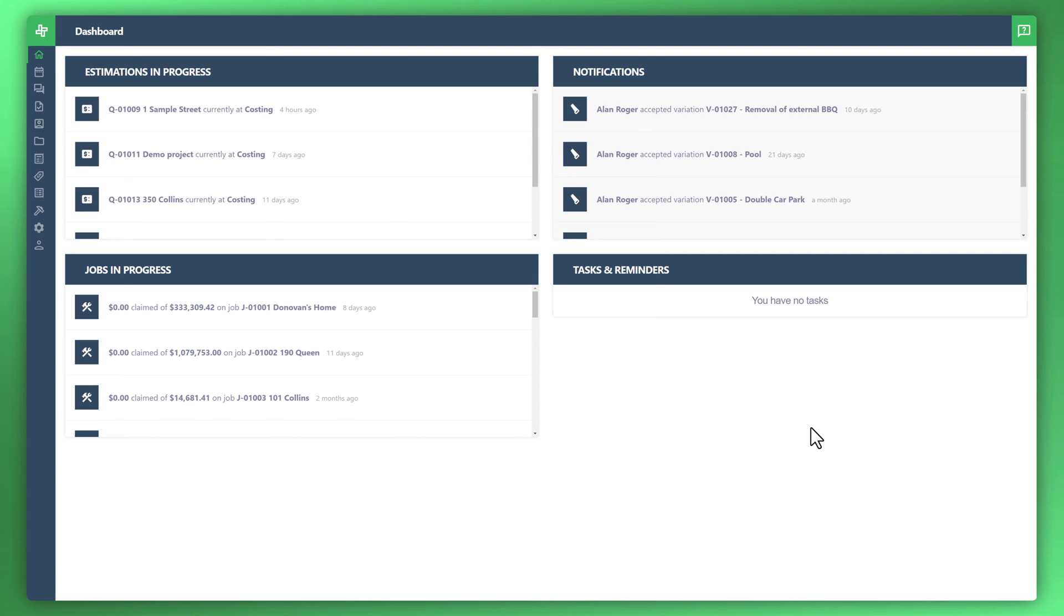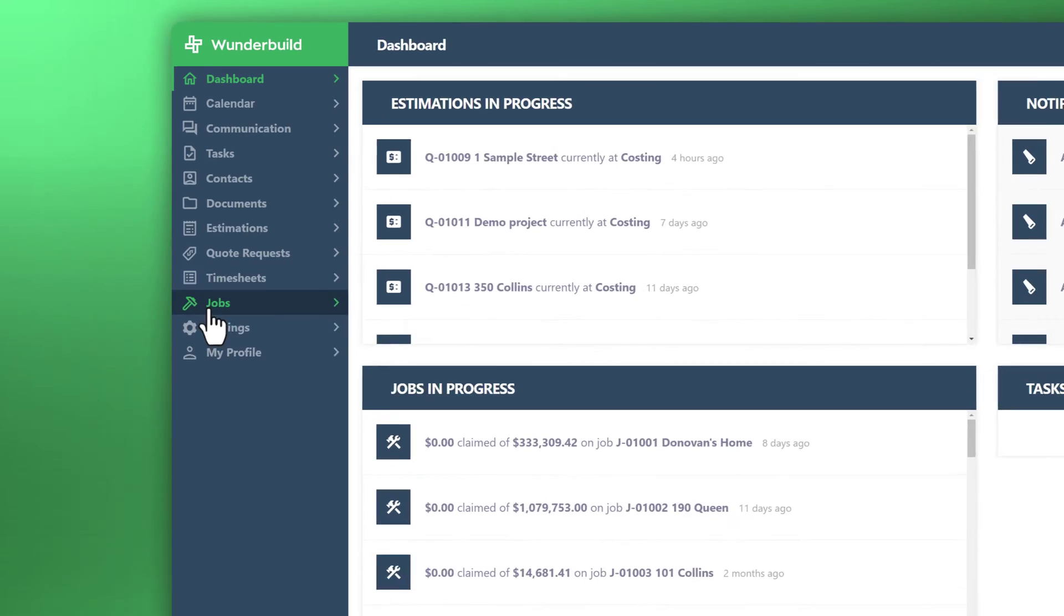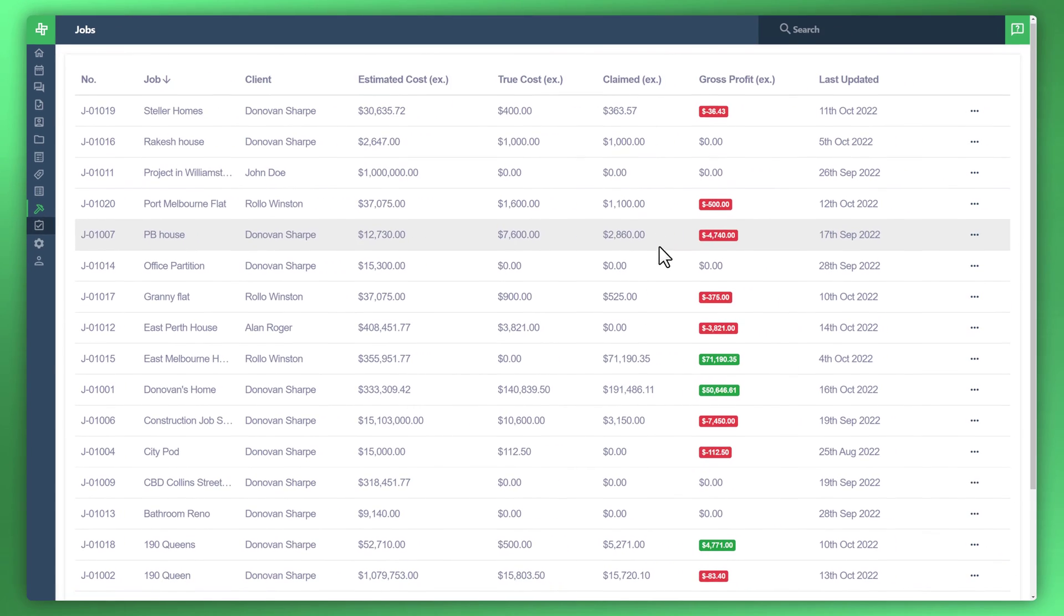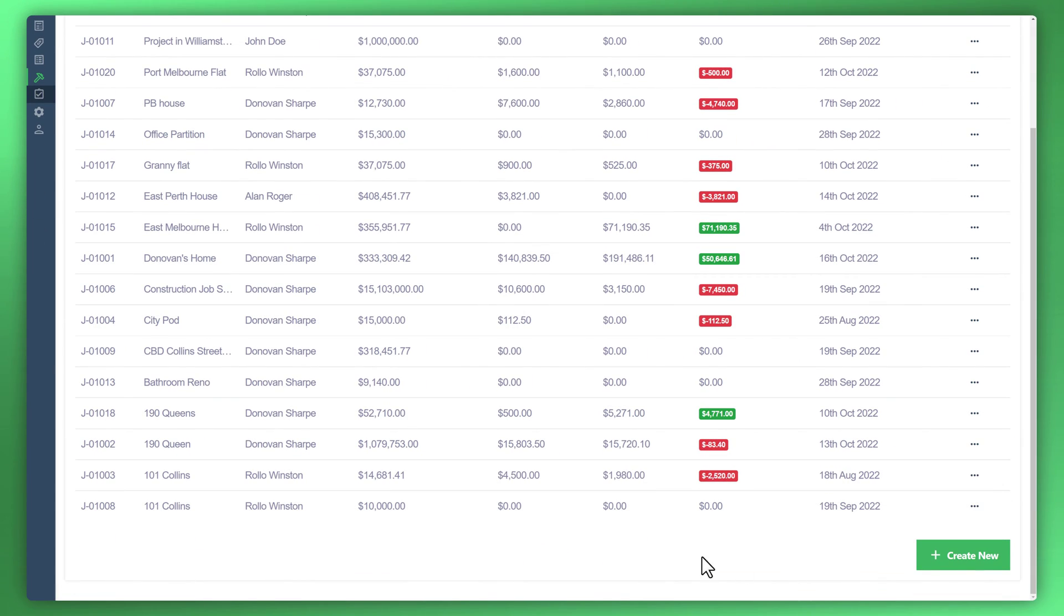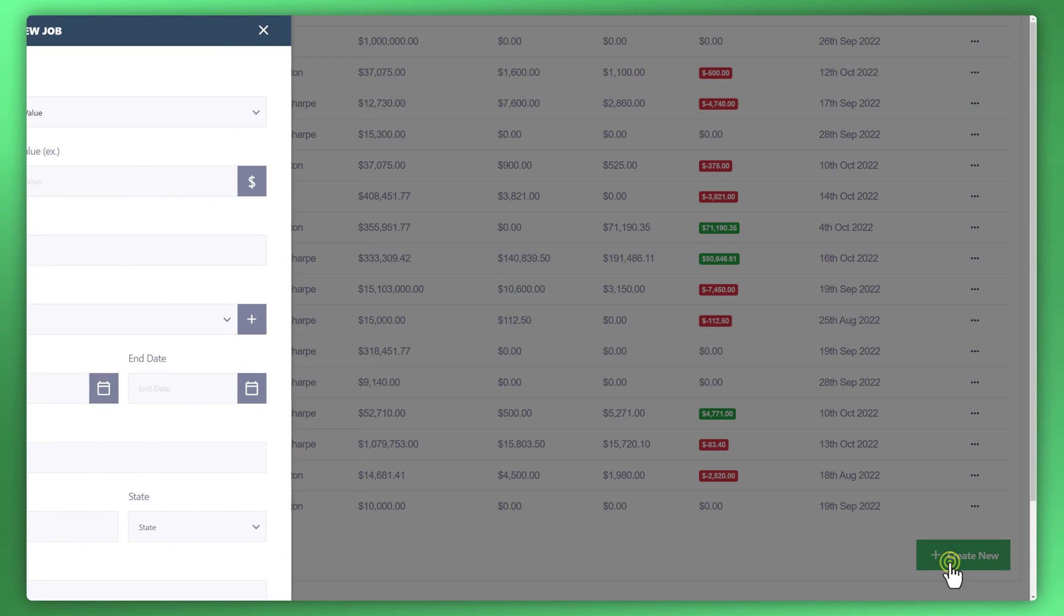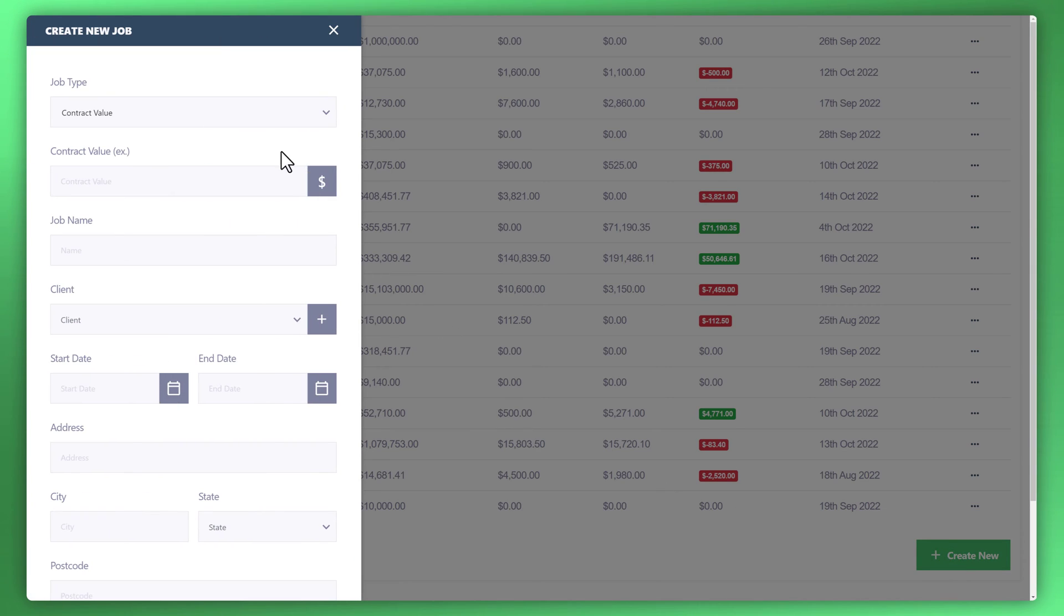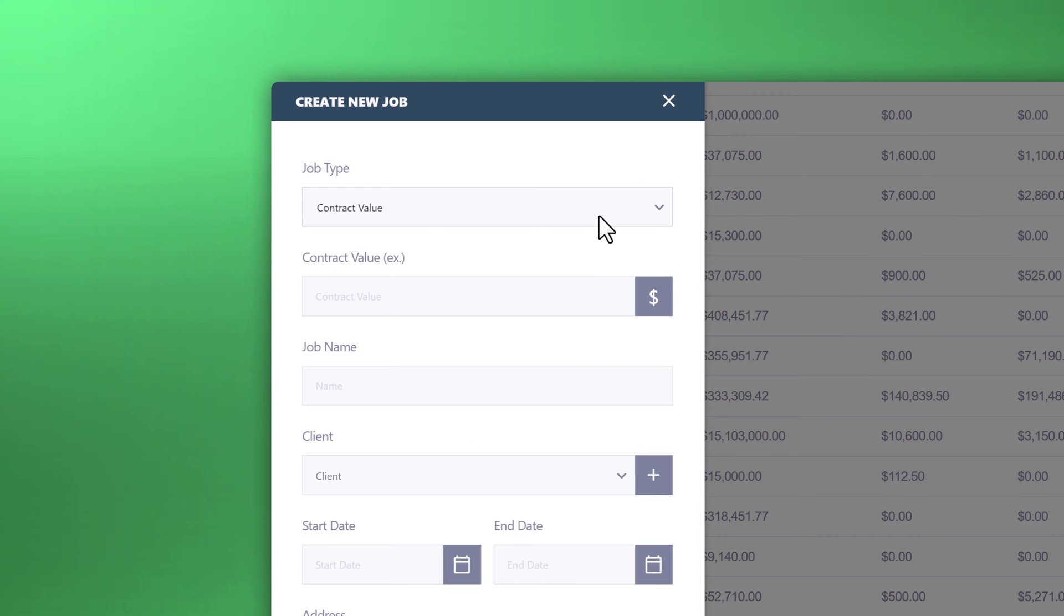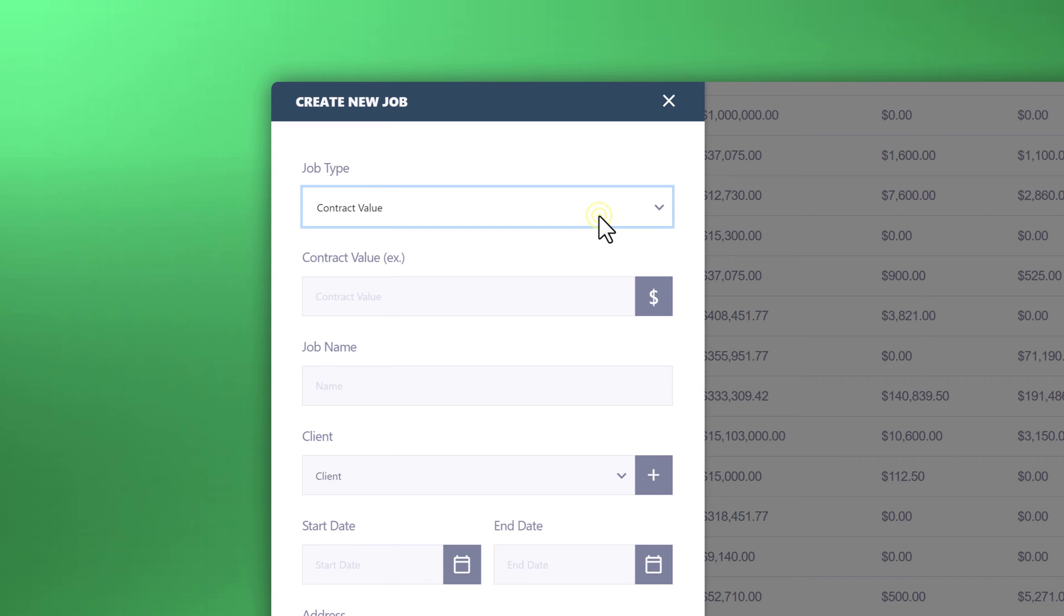Here at WonderBuild we support two contract types. Let's have a look at those. If you go to your jobs on the left side and create new, you can see what those types are. We have contract value, which is your fixed contract value type, as well as cost plus. Today we'll be talking about your fixed contract or contract value job type.